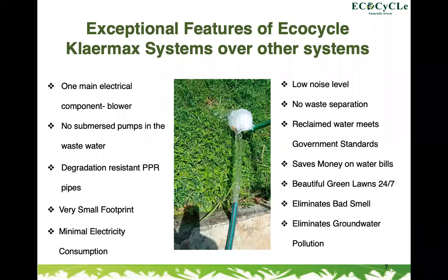Also, it has low noise levels, no waste separation. We take both gray and black water. And then, as I had said, maybe I had not mentioned, but the treated water, as you can see in the picture, usually and always meets the government regulations, or rather the NEMA water regulations. So in case a client wants to discharge the treated water back to the environment, all they have to do is just to apply for the discharge permit from NEMA.